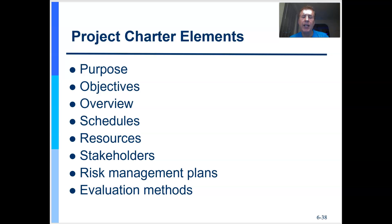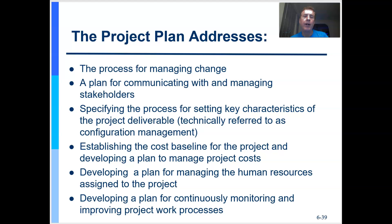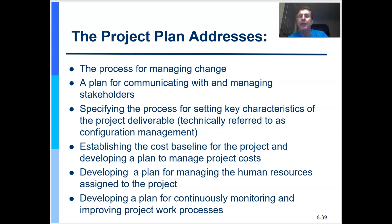A project charter has these general elements — all of them are high level, guiding from your business case down to your charter before you start detailed project planning. After you're done with the charter, you're going to build a project plan. The requirements in a charter are measurable, even though it's high level. The requirements in a project plan are detailed. So both are measurable, but the charter is high level while the project plan provides the detail.